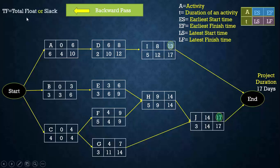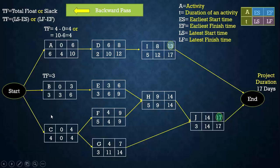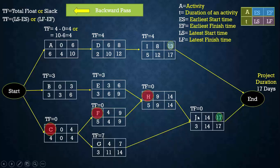Now we will find the total float or slack value. Total float is the difference between latest start and earliest start, or equivalently the difference between latest finish and earliest finish. For activity A it is 4 minus 0, which is 4, or 10 minus 6, also 4. We can find the total float for all activities similarly. For activities C, F, H, and J, the total float is 0, making them critical activities — they cannot be delayed even a single day without extending the total project duration.